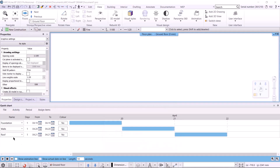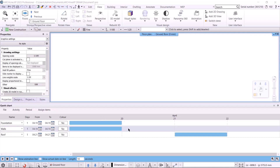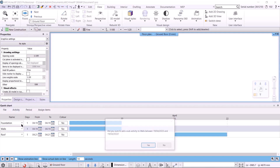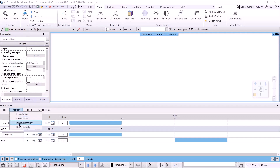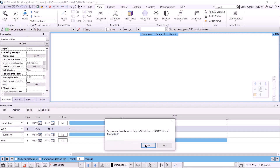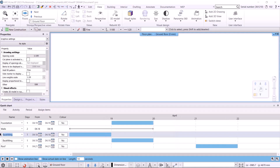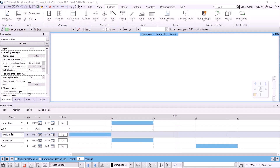The wall construction will consist of two parts: main and interior walls. Each of these will have their own sub-activities within the wall construction activity. We can access these sub-activities by selecting the wall construction activity and choosing the insert sub-activity command, then confirming the creation by pressing yes. I will create another one — I choose walls again, then the activity, and the sub-activity insertion command, then yes again. Let's rename the walls: main and interior.